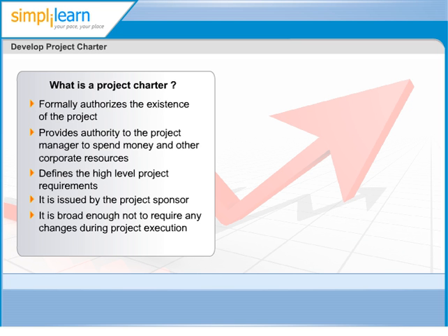and it should be created by the project sponsor and handed over to the project manager. The project manager can do the groundwork to prepare the Project Charter, but it must be signed by the project sponsor.